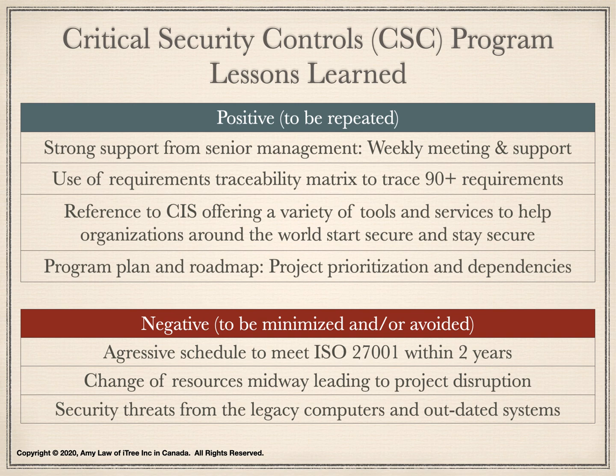The project sponsor participated in weekly status meetings and provided support in whatever way the project team needed. It was the reason why the project was successful. The project leveraged a requirements traceability matrix to showcase 20 critical security controls, which expanded into over 90 critical security requirements. Using the matrix, we made the assessment based on standard measures, metrics, and thresholds. Based on the matrix, we were able to identify the high risk and high value work. Therefore, we prioritized and identified the top 5 critical security controls for immediate implementation. This became phase 1 of the program.